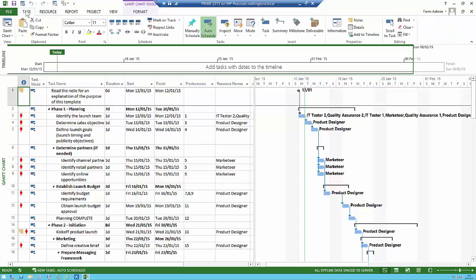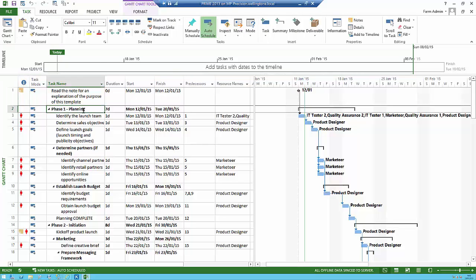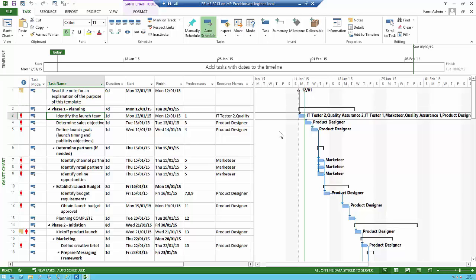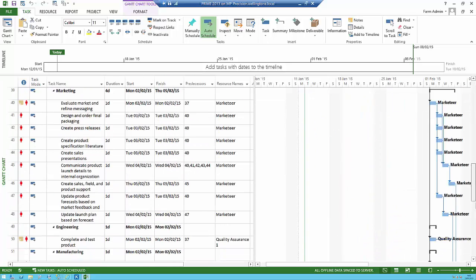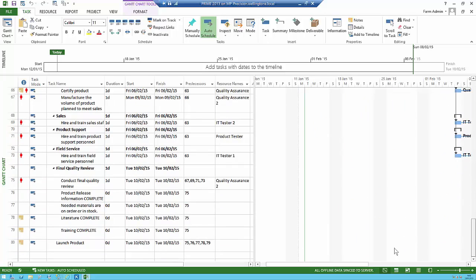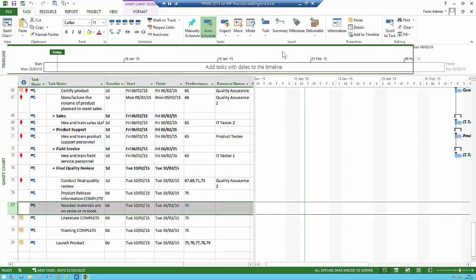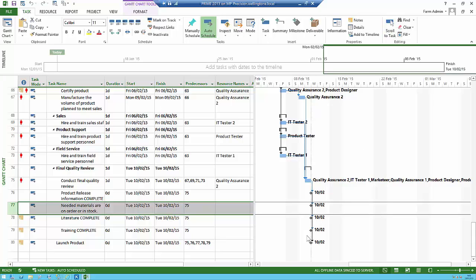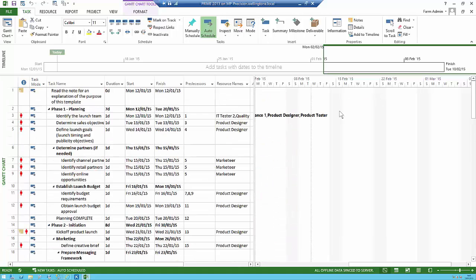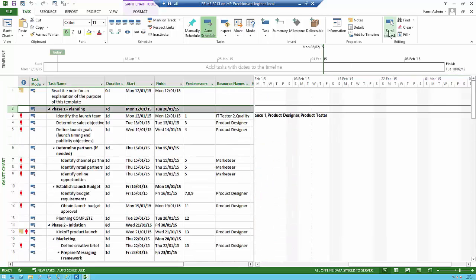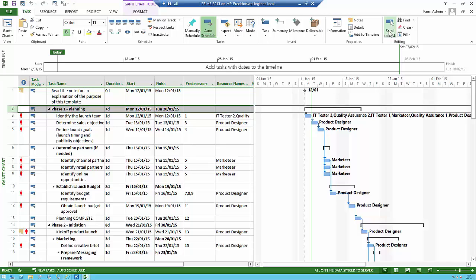The first thing I'm going to talk about is the different task types. You can have a summary task — on the Gantt chart on the right-hand side it looks like a line. Then you have subtasks, called normal tasks, which have a blue bar on the right-hand side. And then you can have milestone tasks, which are zero-duration tasks that appear as a little diamond shape in the Gantt chart. So that's the three task types: summary task, normal task, and milestone zero-duration tasks.